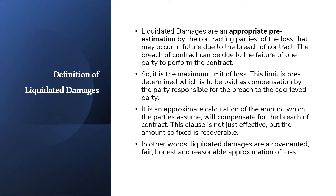The definition of liquidated damages: liquidated damages are an appropriate pre-estimation by the contracting parties of the loss that may occur in future due to the breach of a contract. The breach can be due to the failure of one party to perform the contract. It is the maximum limit of loss, predetermined, to be paid as compensation by the party responsible for the breach to the aggrieved party. It is an approximate calculation which the parties assume will compensate for the breach.